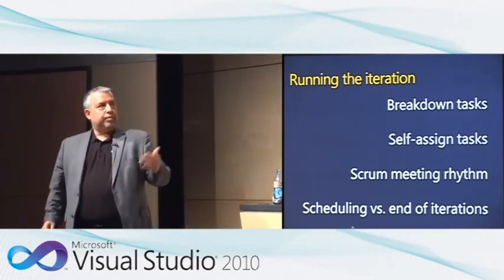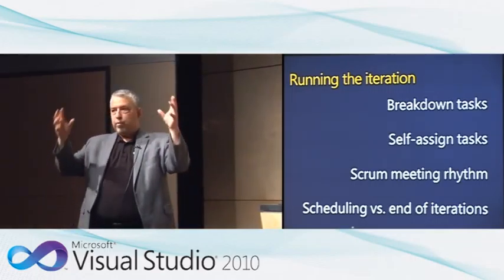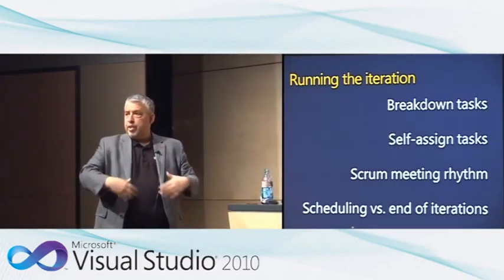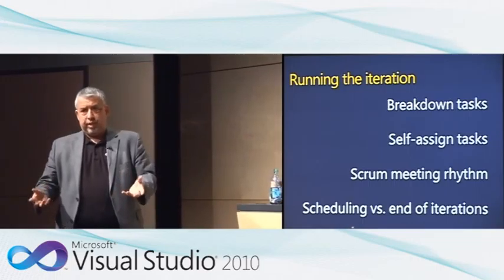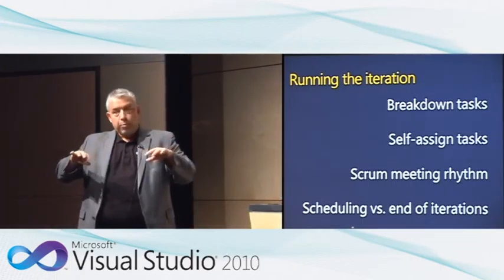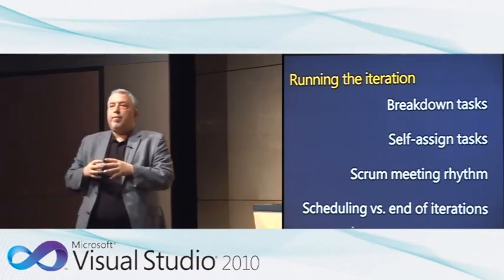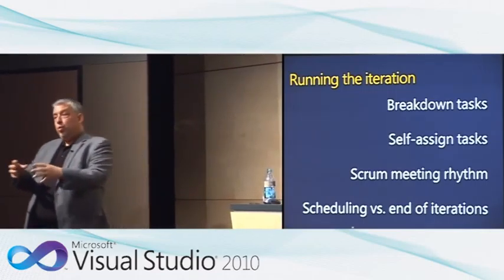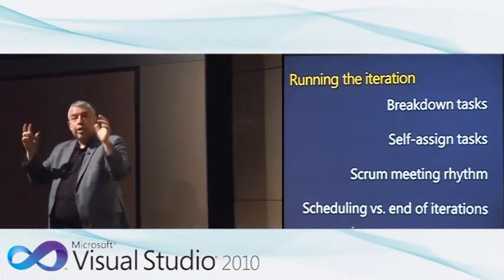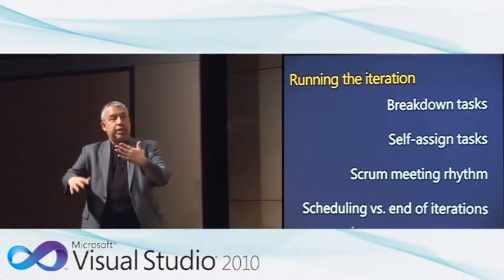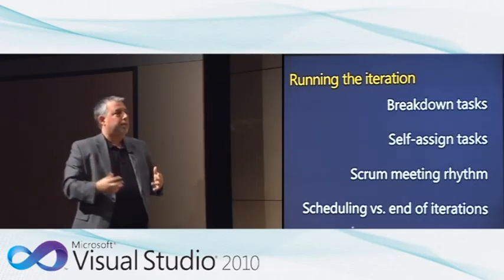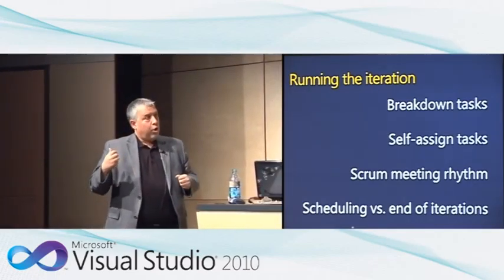And then we run the iteration, very similar to Scrum. So we take every one of our improvement items, we break down the tasks. The team that puts the work in place, the different teams will self-assign the task. And again, we track the tasks from the people providing the change. So the team themselves, when we look at the people who will go receive it and take the trainings or whatnot, for us, basically, they're the customer to the change process. Obviously, they have some tasks to do on their own. They'll need to participate. But the main team is really the people bring it.